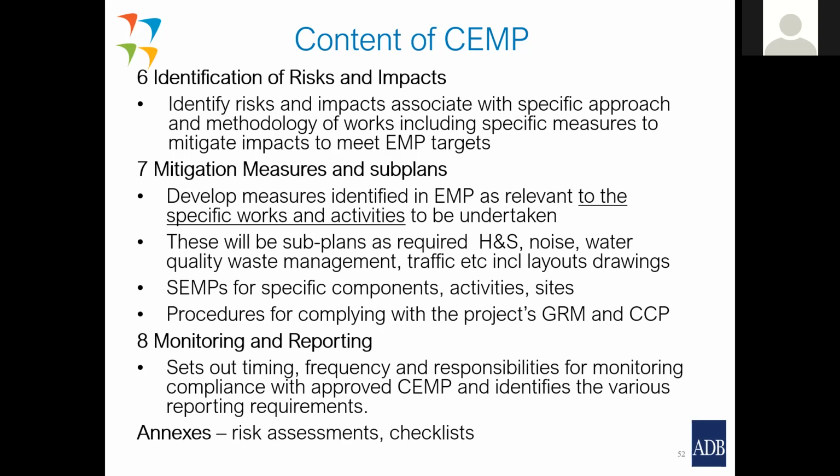And he will be required to ensure that he follows the community consultation plan that is prepared as part of the environmental assessment. And if you refer back to that handout, you'll see I've got details in there of how the community consultation plan is developed through the different stages in the project cycle. And then finally, monitoring and reporting. The section needs to set out the timing and frequency and responsibilities for monitoring compliance with the approved CEMP, and it will identify various reporting requirements.